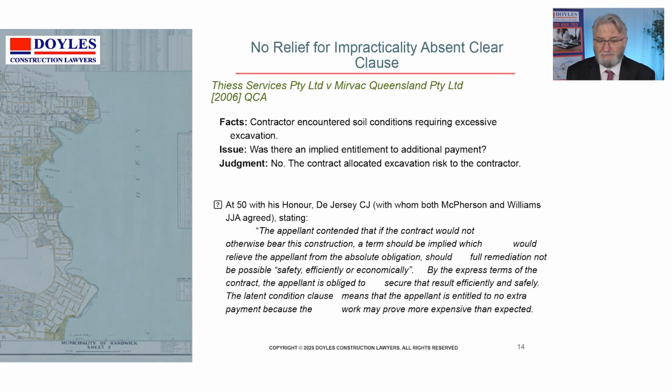For the other aspect, there were other cases which have dealt with latent conditions. Looking at this one, T Services and Mirvac Queensland Proprietary Limited, here the contractor encountered soil conditions which required excavation, and was there an implied entitlement to additional payment? And the judgment again was no. It had allocated the excavation risk, and the judgment was led by Justice de Jersey, a bright and smart judge.